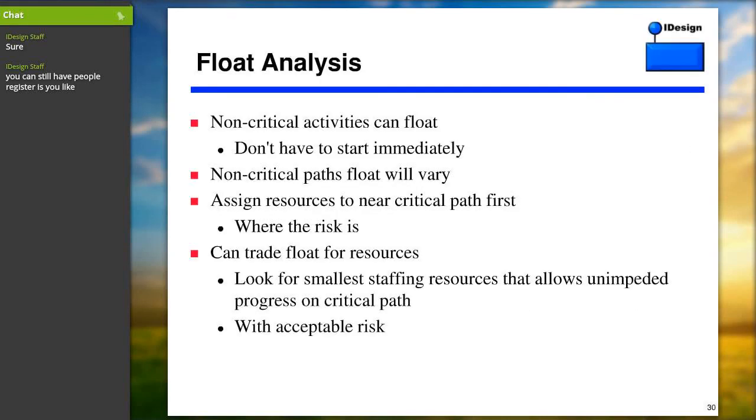Now, there's more to assigning resources than I discussed so far. Critical activities have to be done back to back, back to back, back to back for you to actually finish the project on the time you commit to. But non-critical activities can float. They don't have to start immediately.